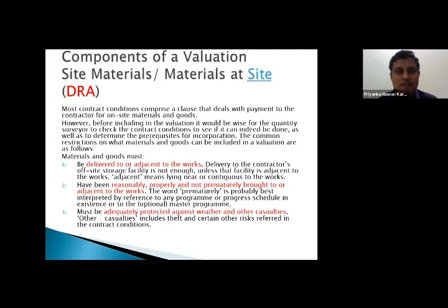So the defined term site, which is stipulated within the Omani conditions of contract and FIDIC 1977 version, has not got these prepositions. So in order to find a remedy to that, in the FIDIC 1987 version, they use the word at, right? The works which are being done at. So it covers everything, right? So this is what I wanted to tell. In order to identify the vertical and horizontal boundaries of the word site, you should not use a non-exhaustive list of prepositions. That is being corrected now. Anyway, now I'll come back to the subject here.